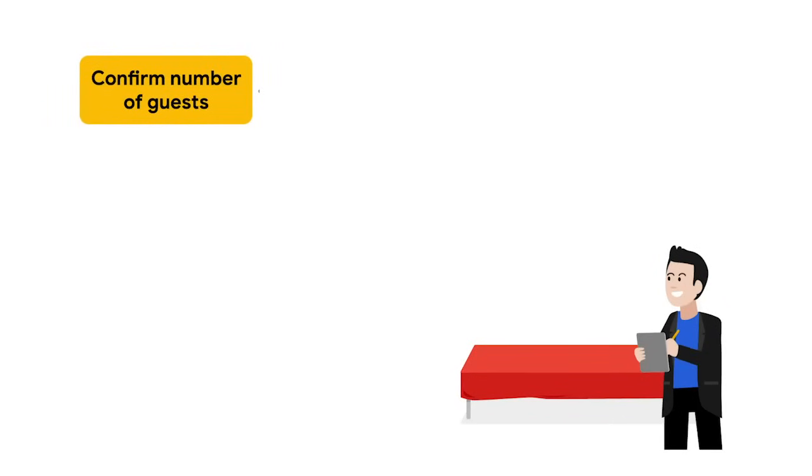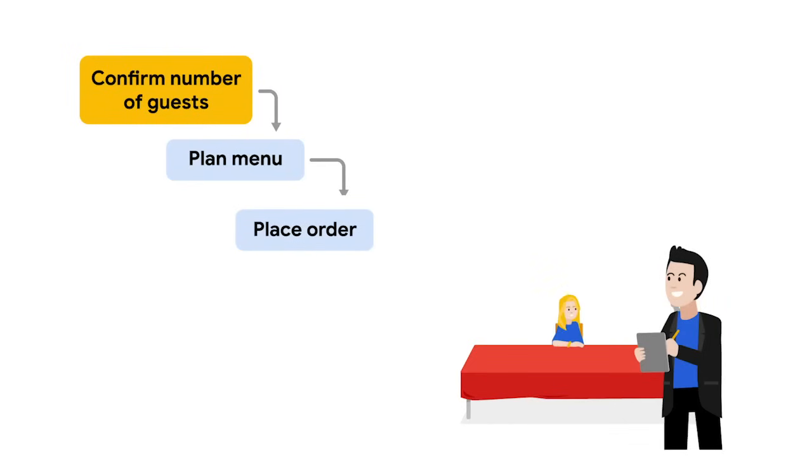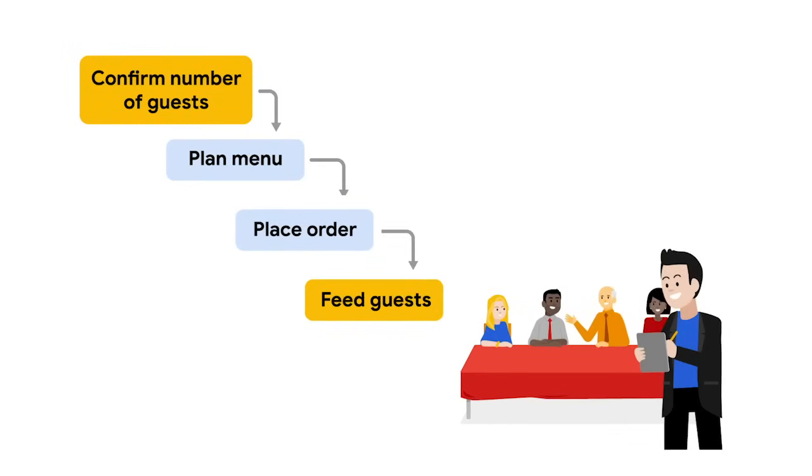For example, if you were catering an event for a client on a very tight budget, you might want to use Waterfall methodology. This way, you could confirm the number of guests first, then very clearly define the menu, get approval and agreement on the menu items and costs, order the unreturnable ingredients, and successfully feed the guests. Because the budget is limited, you can't afford to make changes or waste food. The traditional method won't allow for the client to make changes to the menu once the order has been placed.